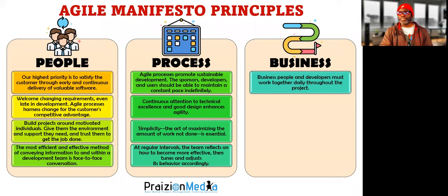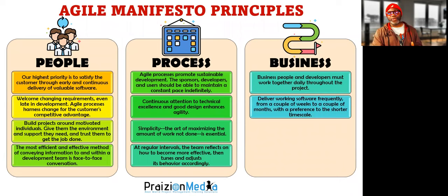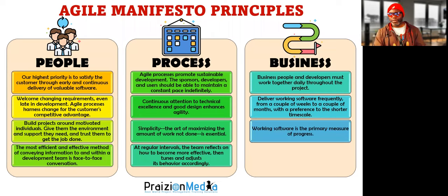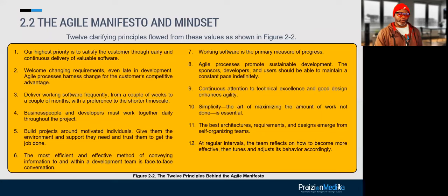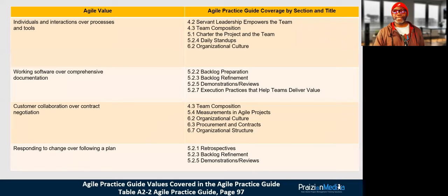Business: business people and developers must work together daily throughout the project. Deliver working software frequently, because you're doing things in small iterations and you need to deliver quickly so that we can inspect and understand if you're going in the right direction. Working software is a primary measure of progress — we don't do percent completes in the world of Agile. And the best architectures, requirements, and designs emerge from self-organizing teams. Those are the 12 principles at a very high level.